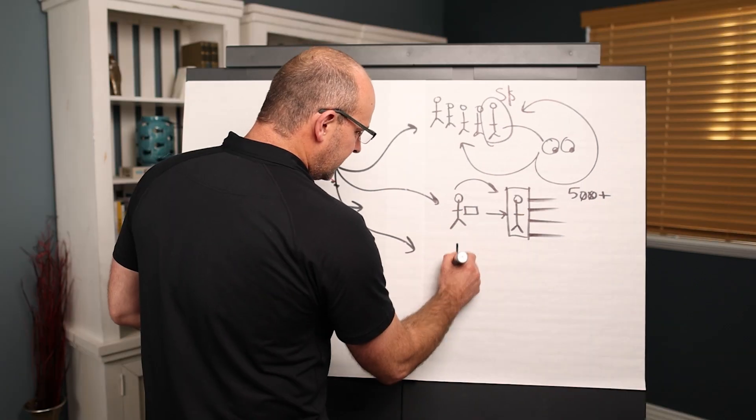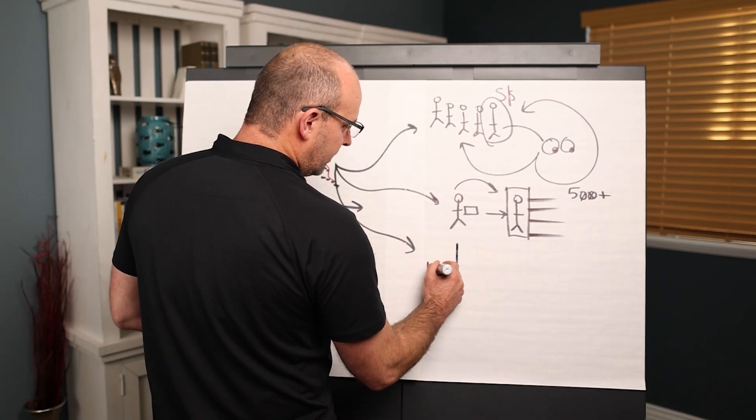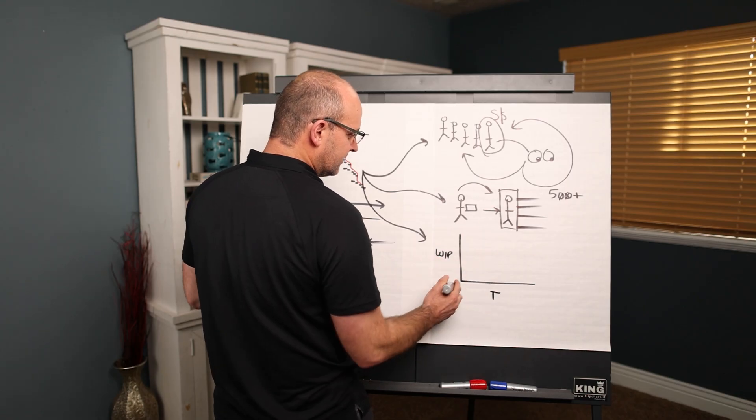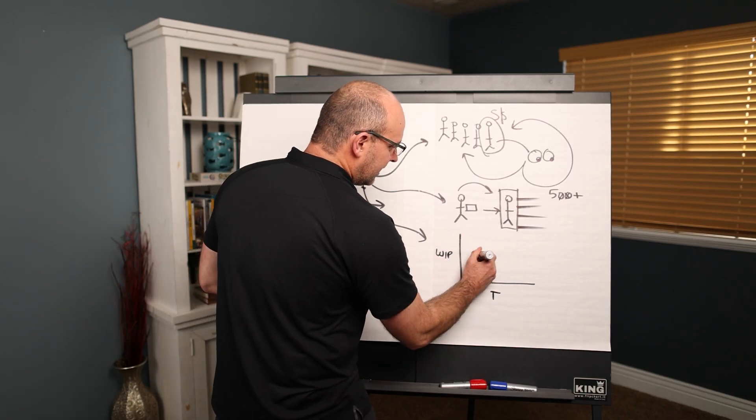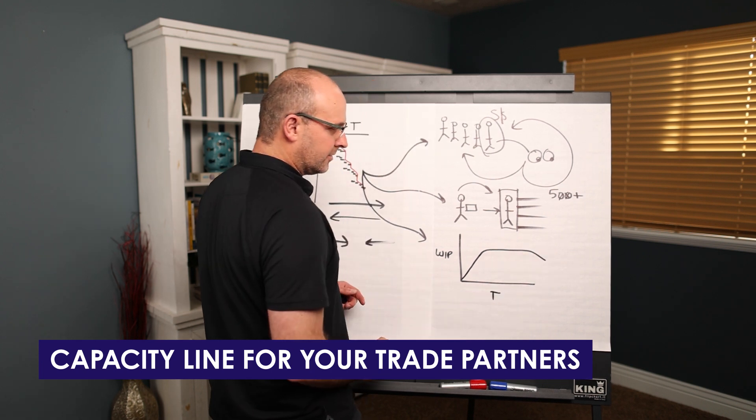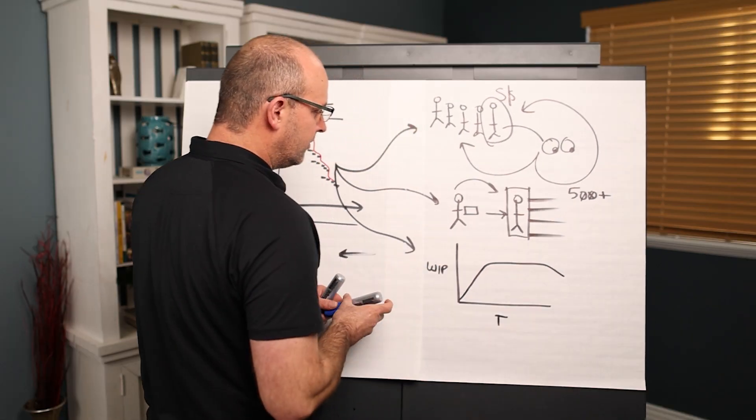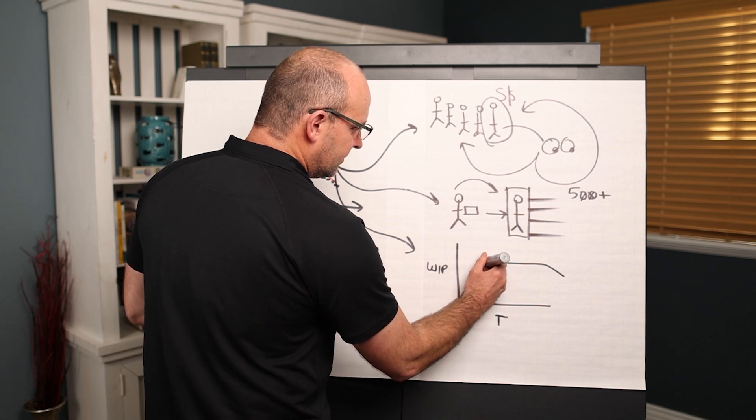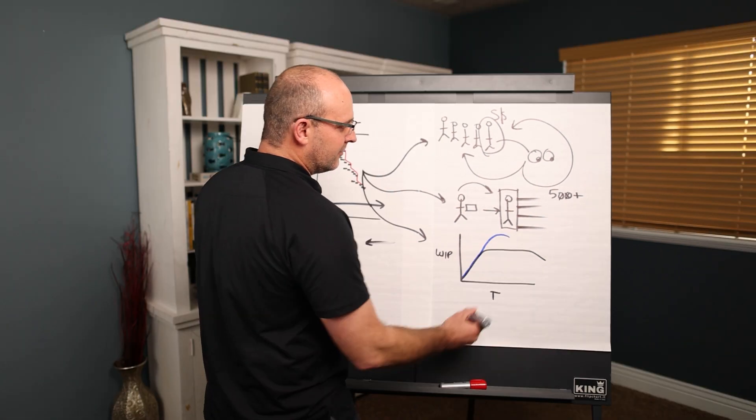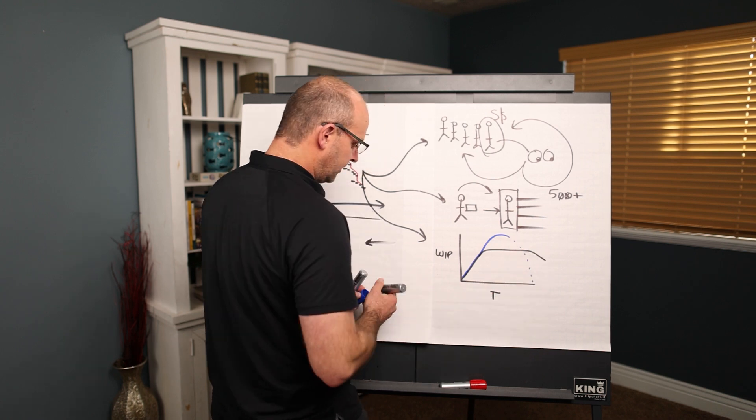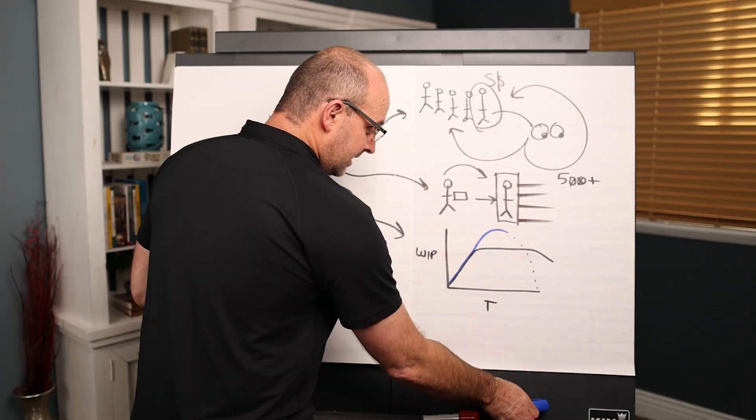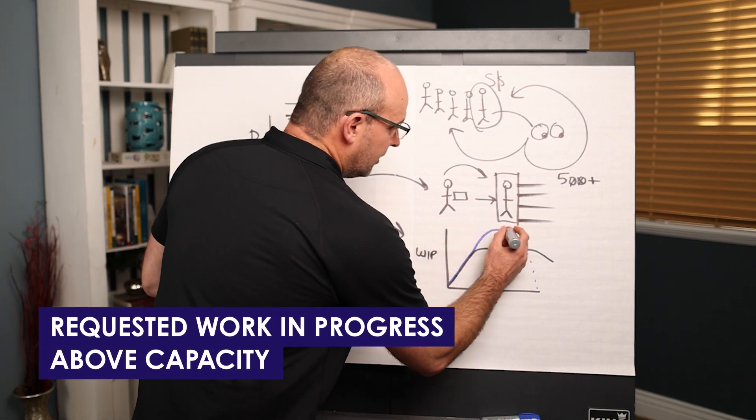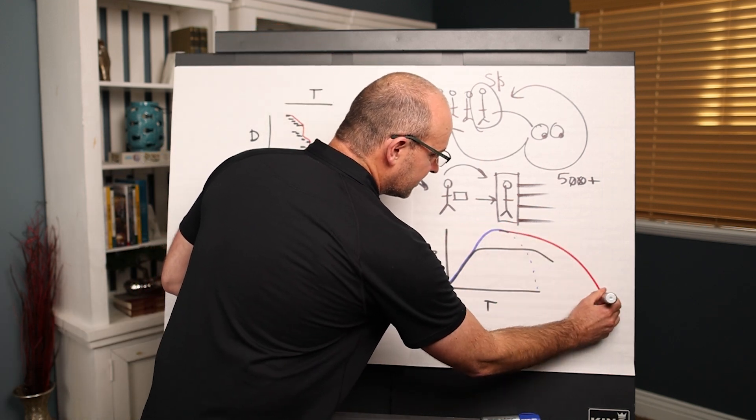And what happens is, if you look at this from a work in progress and a time chart, meaning at the intersection of this, there is a capacity line for your trade partners. Let's say it's listed there. CPM will say, oh, yeah, okay, well, let's do this, trade partners, you have to do this. And here's the point, everybody thinks that CPM is going to let you finish your project sooner. No, it won't. That is not how it works. As soon as you increase the requested work in progress above capacity, your project is actually going to finish out here,